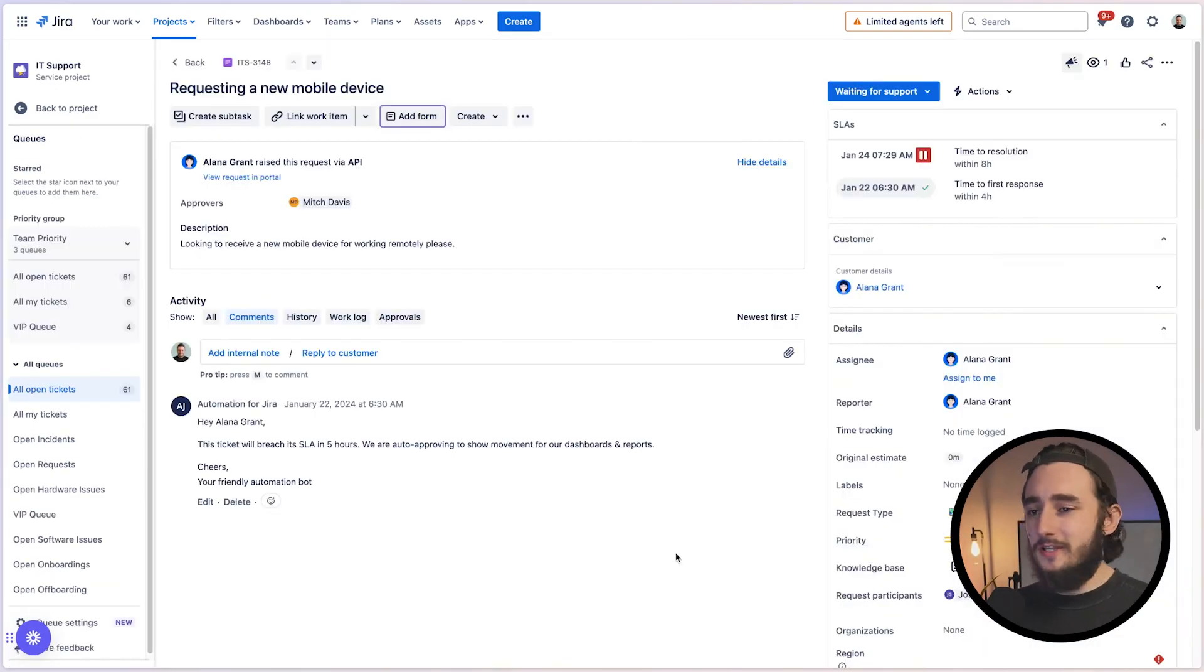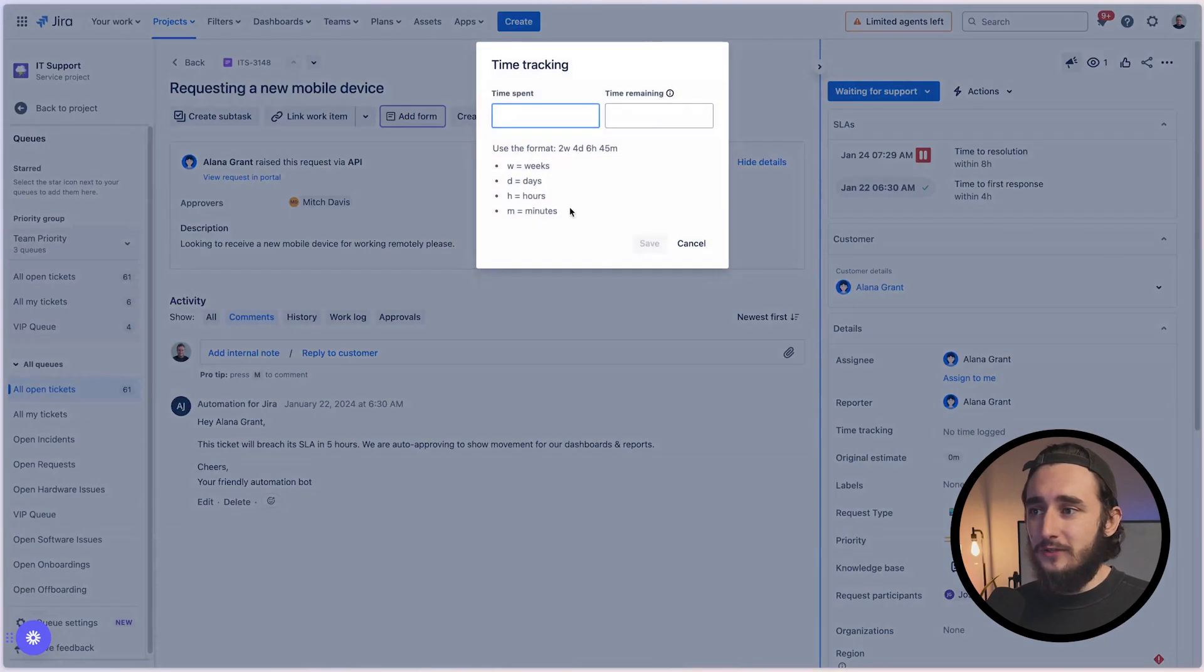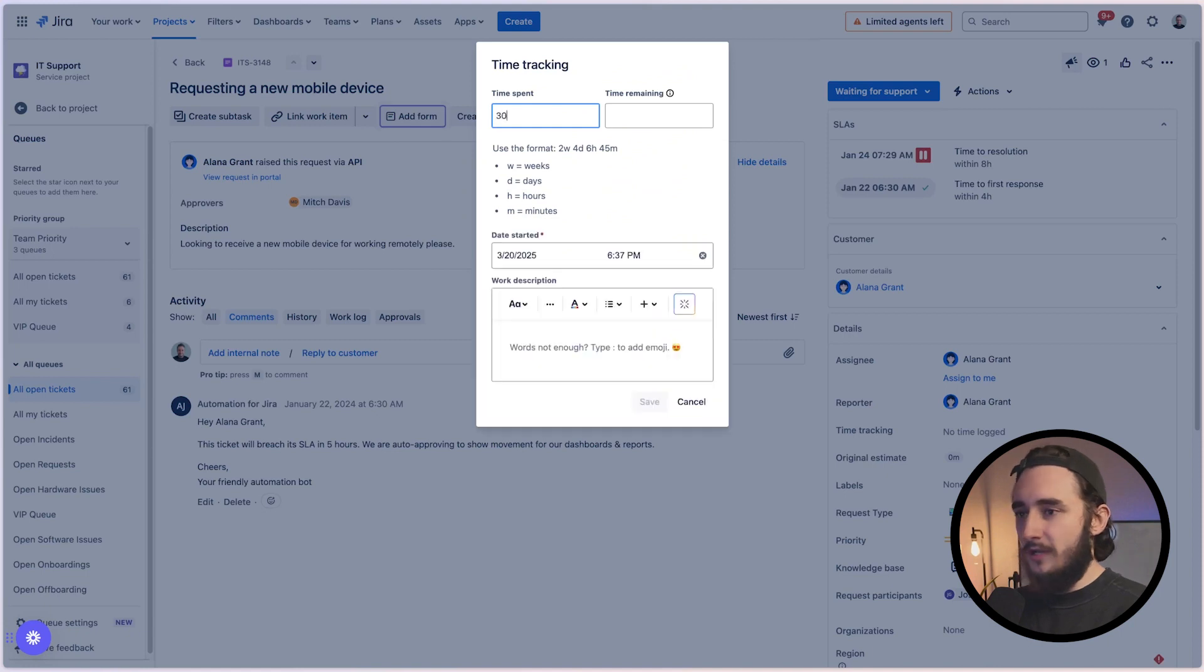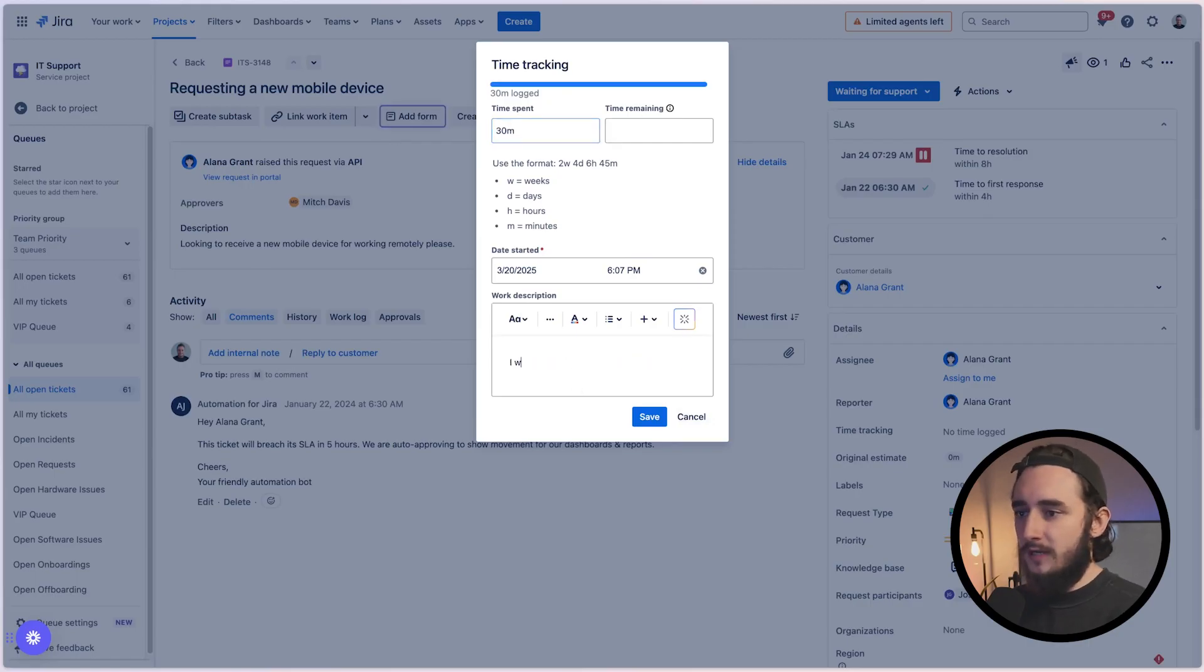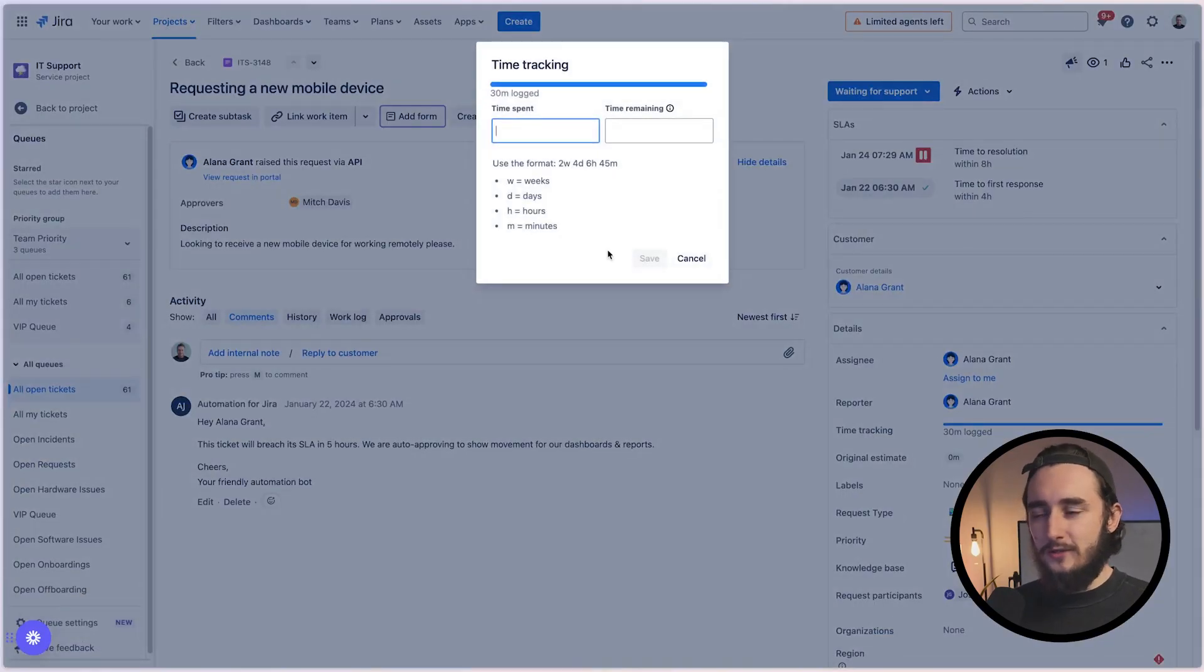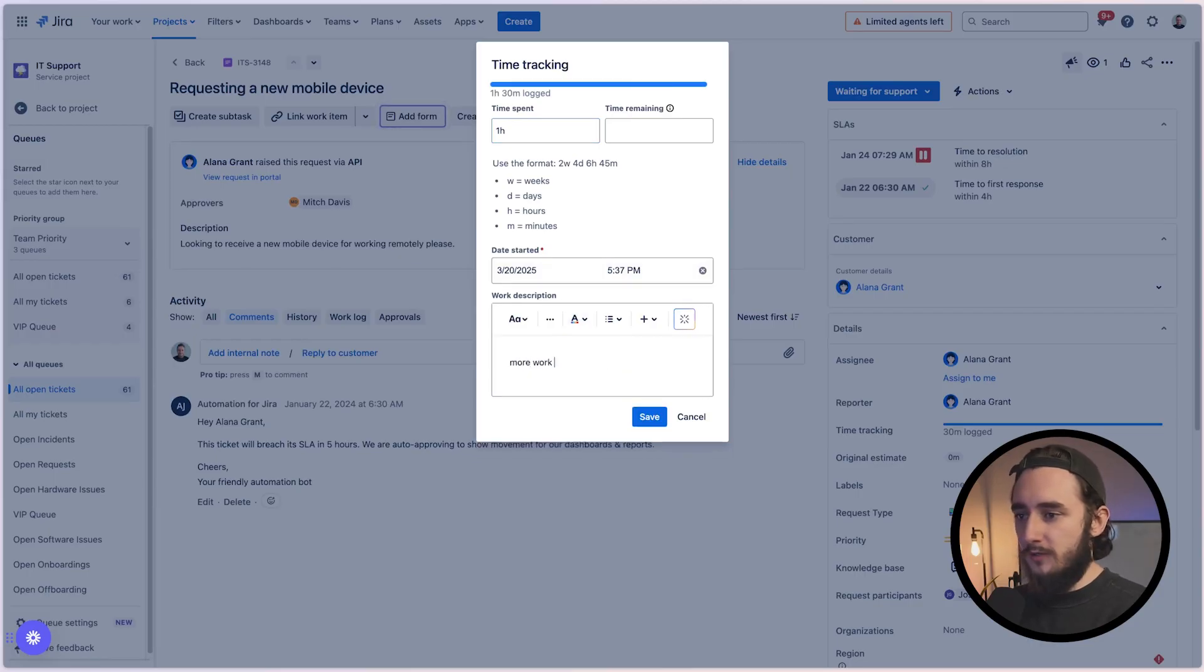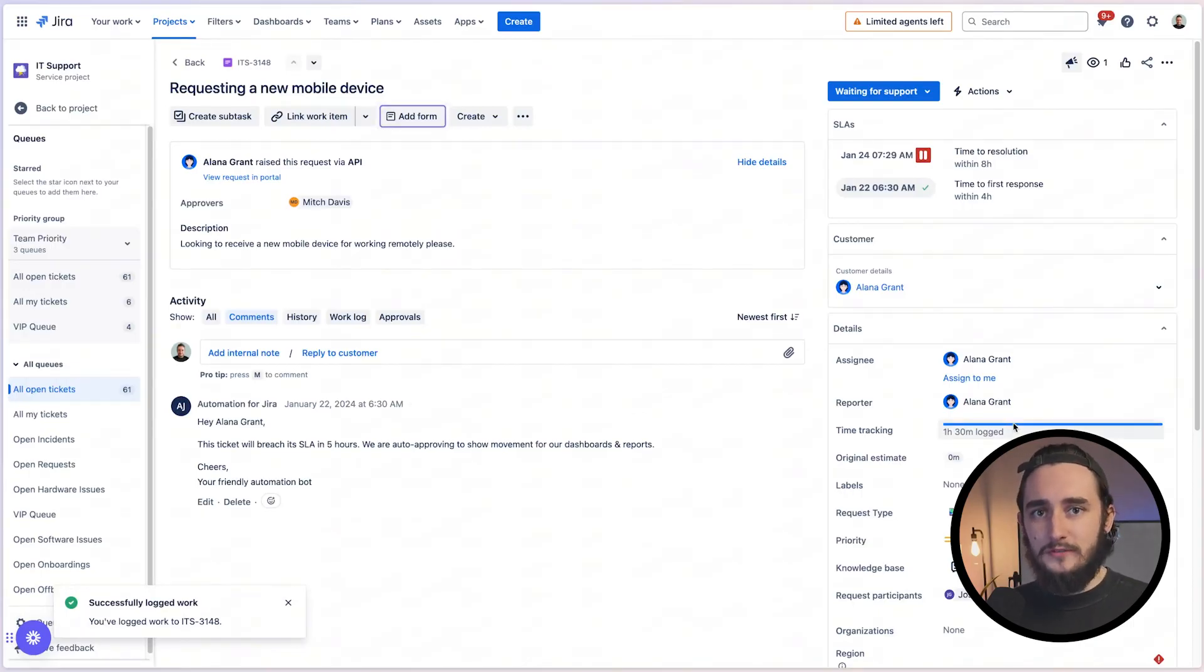Back in my project here, I could see that the time tracking and original estimate fields are now located on the right side. So how is time tracking actually done in Jira? It's pretty simple. All you really have to do is click on the field and there's a little formula here that shows up that tells you exactly how to do it. So if I'm logging in 30 minutes, I type in 30M and I could add a time remaining as well if I need to. And I could add a little description here if needed. I worked on something and I'll click save. Now I've logged 30 minutes and I could go back in and log more time if needed. So if I come back here the next day and maybe I log one hour and then I add more work completed and I click save, I've added more time. And there's a total of one hour and 30 minutes logged at this point.